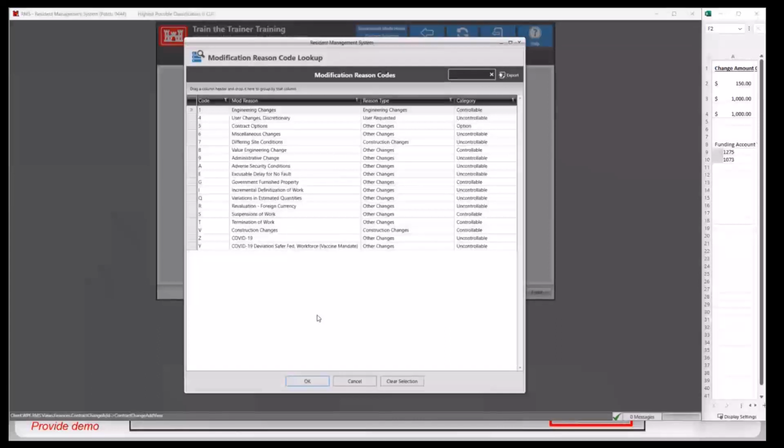What that means is the award duration showing in the milestone schedule module will not have time added to it, but the originally calculated contract required completion date will reflect the time added in the mod.